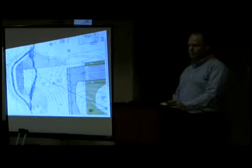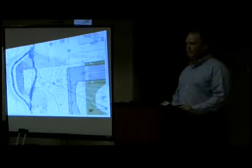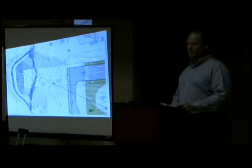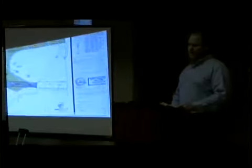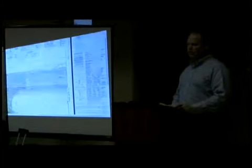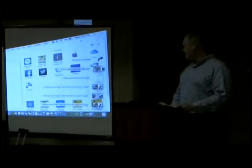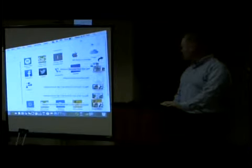During construction, which we hope to start in 2016, we anticipate a closure period for the winter between the end of 2016 and start of 2017. We did have some mention in the notice of intent of the interim shutdown period, but the plan information was lax as well as the detail. One of the major plans added to the NOI plan set was plan sheet 301A, called the interim shutdown period plan at the runway 5 end. It shows where we anticipate having the fill elevation 2 before we shut down and all the stormwater controls that will go into shutting it down properly, monitoring it during the shutdown, and then reopening it. The major item of this interim shutdown period that was not a part of our original notice of intent plans was, you will see, and I don't know if you can find 301A.